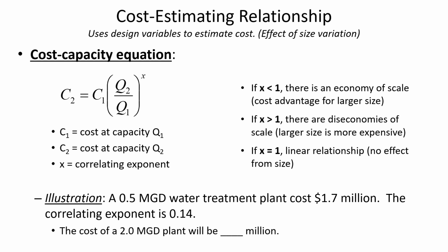How much is it to get a pallet of shingles? Then C1 is the cost of 1 bag of shingles, and Q1 would be the number of shingles in a bag. Q2 would be the number of shingles on a pallet. C2 would be the cost of the pallet. And then if you have all the cost data for 2 different items, then you could calculate what is X. So you would have to also consider transportation costs as well.